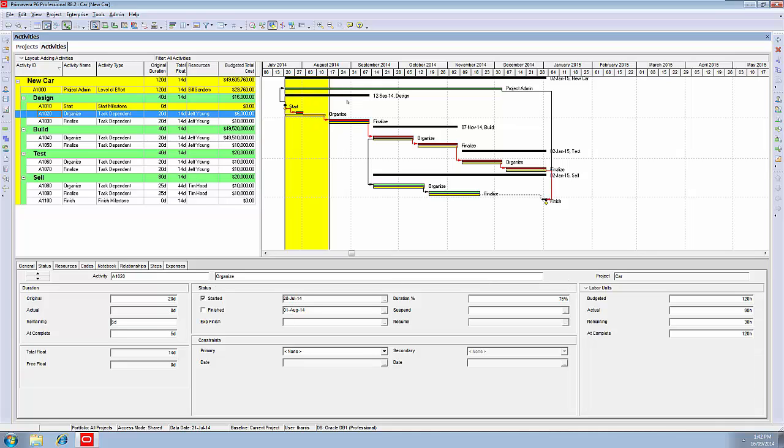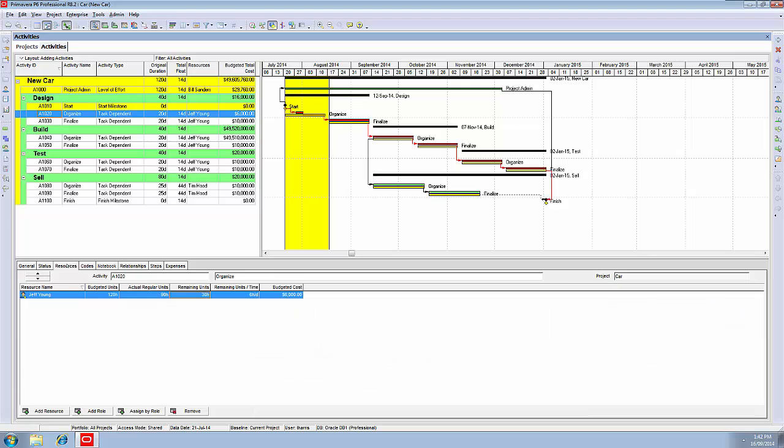Notice that what we see in the Gantt chart at this point in time, before we've scheduled, is not correct. Don't make any decisions at this point in time, looking at the Gantt chart. It's not right until we reschedule. Remember, every activity, when you're updating it, requires three inputs. First, the dates, then the resource hours, then the expenses. Resource hours - it's put in information based on what we put in the status tab.